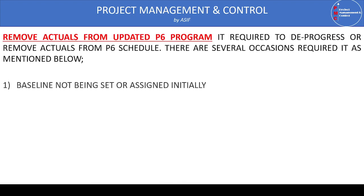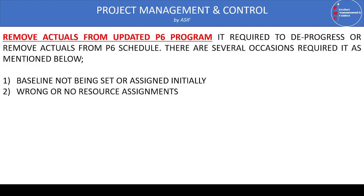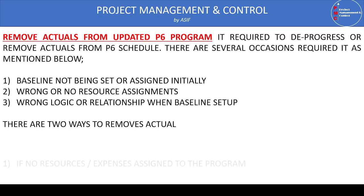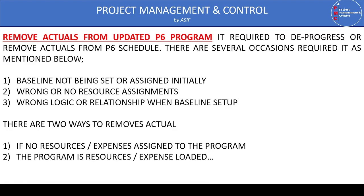The first reason is that the baseline was not assigned or finalized at that time, and the BOQ was not finalized either. Because the BOQ is not finalized, quantities are not finalized, and we cannot compute the resources or assign exact resources and expenses in the program of works. Sometimes there's also a change in logic which needs to be rectified. So we cannot consider that three-month program as an approved baseline or use it to make payments to the contractor.